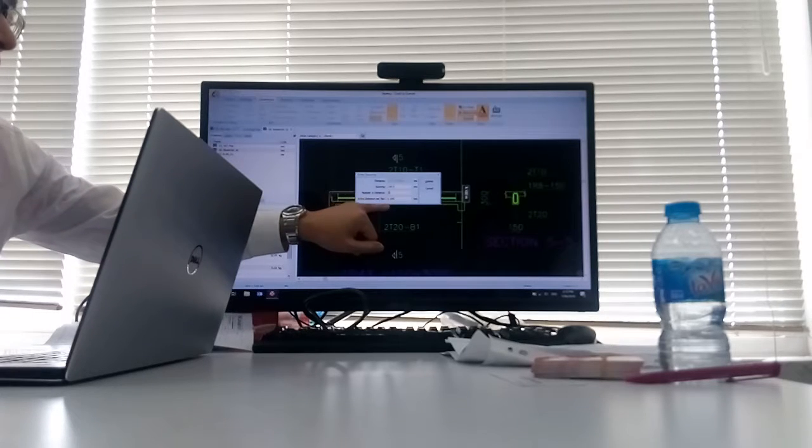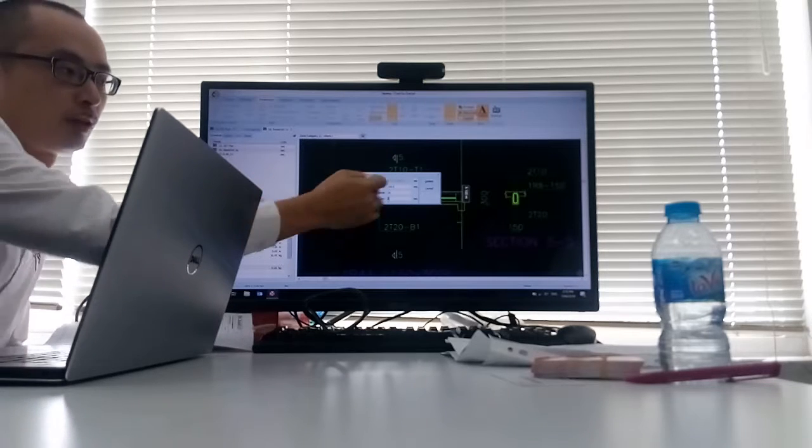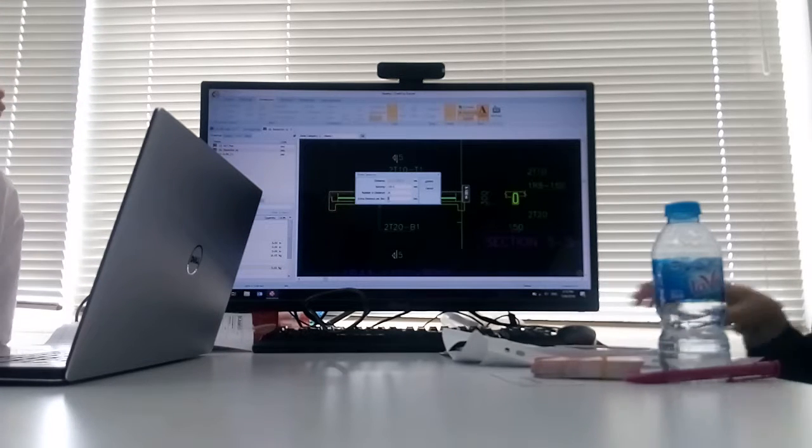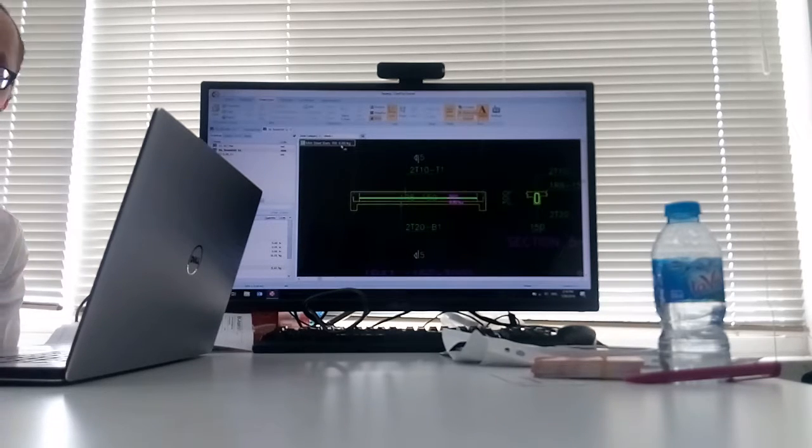As for the extra distance per bar, normally when the draftsman provides you this sort of drawing, they will never include the bends and hooks inside. So that is where you input the extra distance per bar. But for this you need to do some calculation. Let's say it's 24D, you need to do 24 times 8. So just for example, I key in a figure of 192, and once I click update, the software will give you